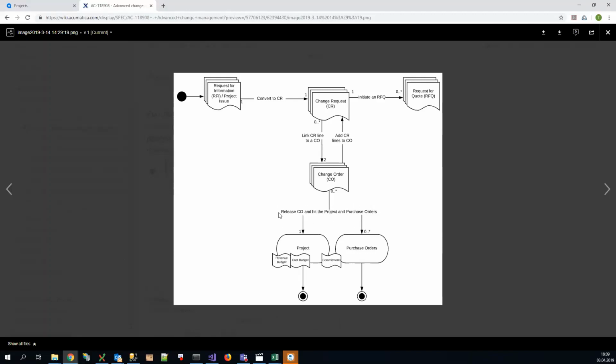However, there might arise a need to have two-tier change management. That is, the change management that supports two types of documents: atomic changes held in small change requests, and change orders, the bigger documents that comprise small change requests within them. A change request is also needed to allow people in the field at the construction site to create some quick documents with the minimum information, save them immediately, and send them for approval to their managers and to the people who are in charge of making the decisions for approving and not approving changes.